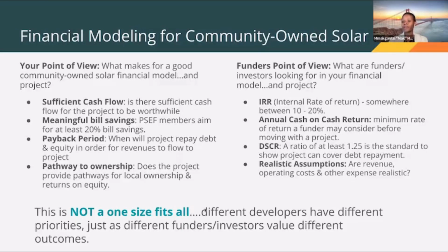And then things like, is there a pathway to ownership, which is something that's really important to a lot of PSEF members. From a funder standpoint, things like the project's internal rate of return are going to be important for investors. And generally, a project IRR of between 10 to 20% is considered a good rate of return.